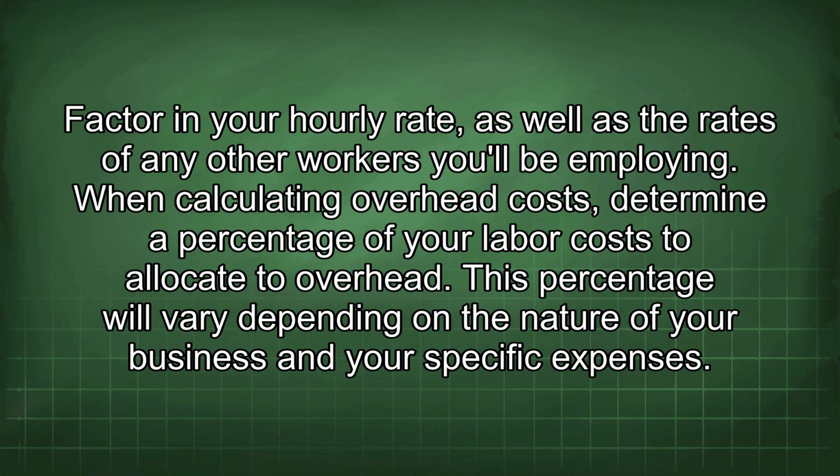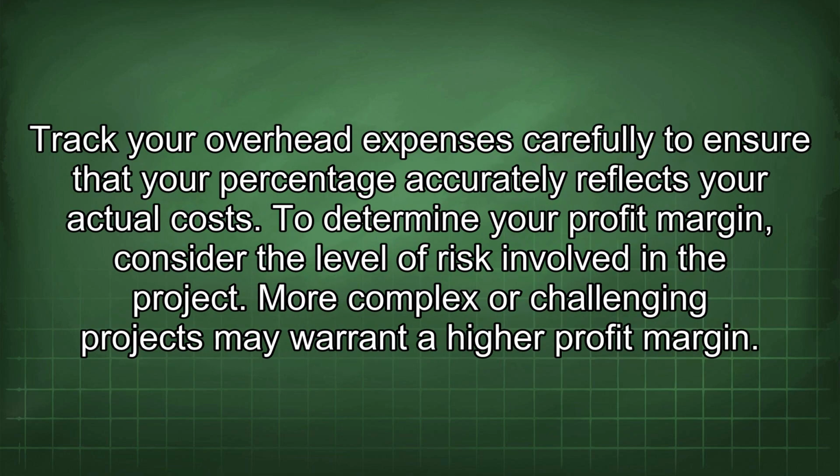When calculating overhead costs, determine a percentage of your labor cost to allocate to overhead. This percentage will vary depending on the nature of your business and your specific expenses. Track your overhead expenses carefully to ensure that your percentage accurately reflects your actual costs.